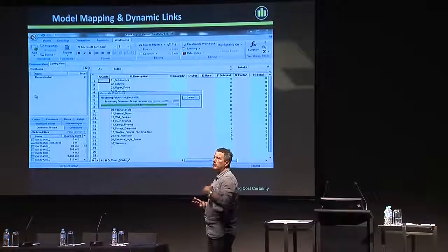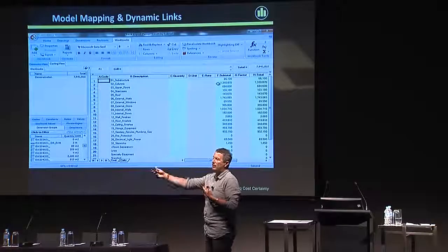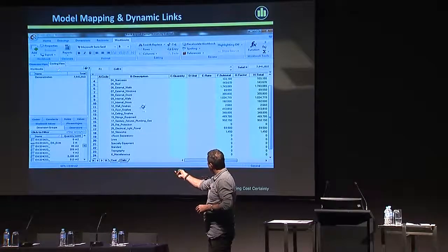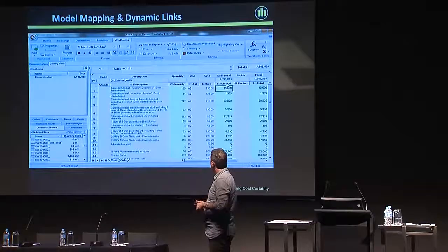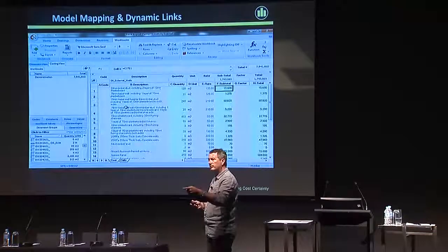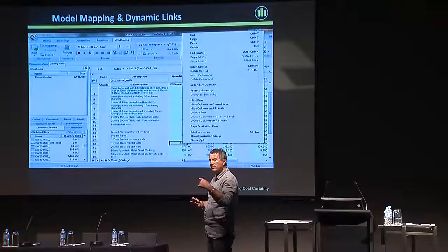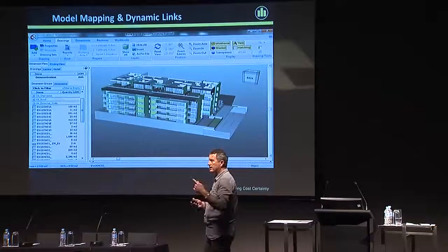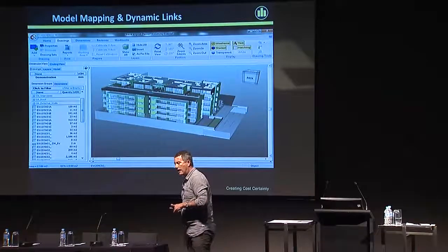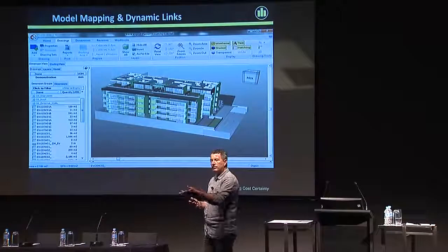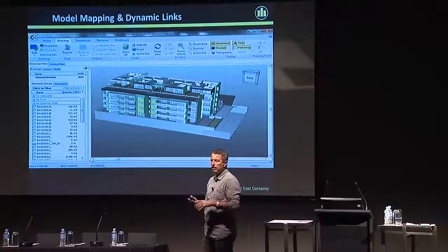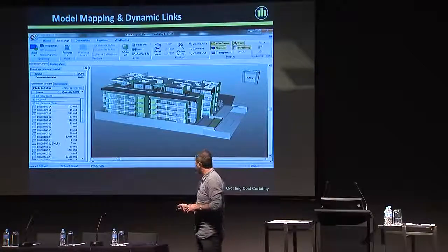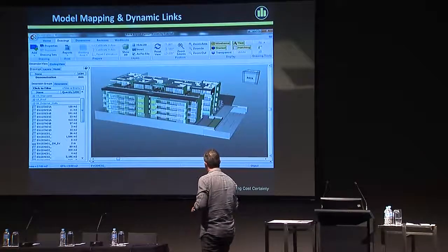The next phase is we import our workbook, and it's attached to a price list, and it starts to formulate our actual price. So on this project, it was $8 million. In terms of time, this is double speed. So when we talk about real-time estimating, it is something that can be done, and it can be done extremely quickly. On some of the projects we work on, we do this weekly. On others, we do it fortnightly. It depends on what the clash system is and the exchange of information that's going on, how quickly it's moving.